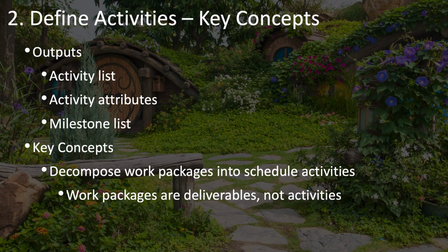A key concept to keep in mind here is that you're going to be decomposing the work packages that you put together when you did the WBS and organizing those into schedule activities. Remember that the work packages are the deliverables, not the activities, and that we held off earlier on getting down to the level of specifying activities. And now is the point at which we do get to that level of detail and identify those activities needed to accomplish those work packages. And those go into or connect with the framework of the work breakdown structure.